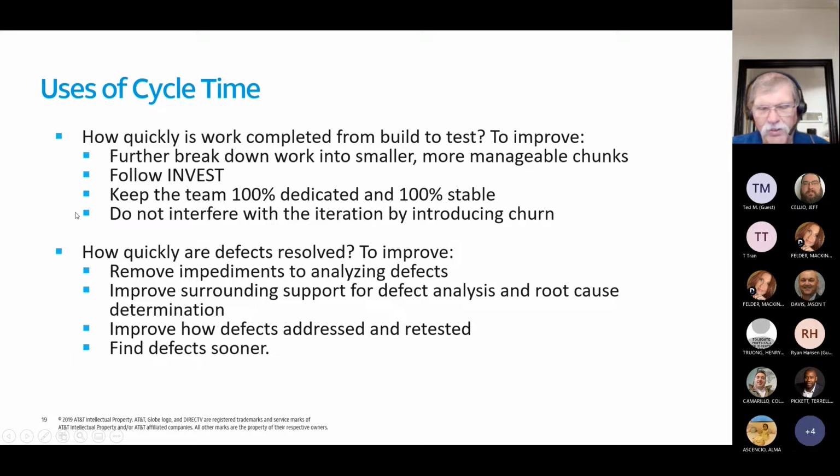Also, we don't mess around with the backlog. Okay. Once the iteration is set, ideally you don't change what the priority order is the team needs to work on. Okay. You change that, it's going to have adverse effects. Unless you do it on a boundary where whoever is going to be addressing that effort, okay, unless they're 100% dedicated, if they don't have to stop other work, then yeah, you can do something like that.